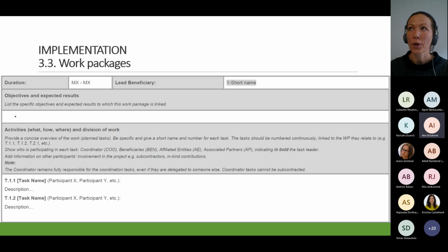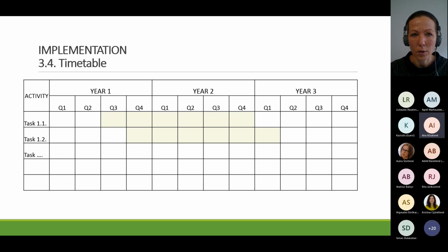I can tell you in our project we have management and planning. Then we have restoration. Then we have demonstration and advice to farmers. Then we have monitoring, the obligatory one, and replication and networking, the obligatory one. So we have 6 work packages in the project that we're writing this year. I don't know. We'll see whether it's good or bad. And then the tasks are, well, it's obvious what tasks are: something that you do and where you have some kind of output that leads to something else, or to a result, stuff like this.